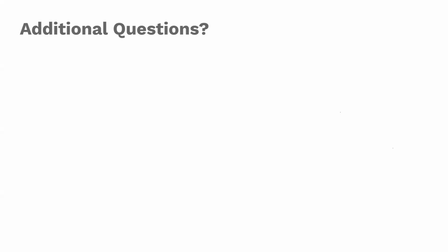I think it depends on how big of a change we're talking about. Some things can be handled by what are called ASIs, Architectural Supplemental Instructions, or requests for additional information. So if the contractor just has a question that the architect can help clarify, it might be a simple sketch or just a written response.